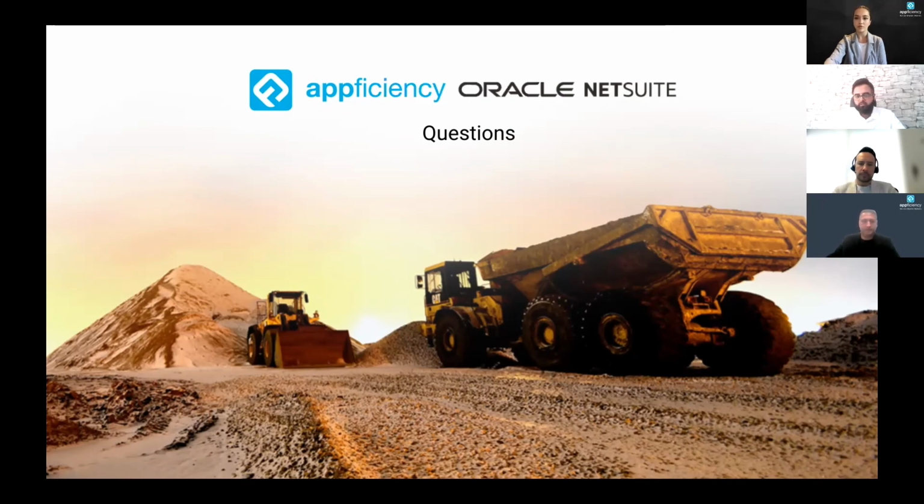And our system is very much capable of handling all of that, especially the way we bring those work codes into the system and how we report on them. We can set up those parent-child hierarchies, and then we can do different kinds of reporting as we look at those codes. We can drill down into deeper levels and tag our costs to lower-level codes, or CSI codes, and then we can look at the reporting from a division-level code, and that's all quite possible in the system.